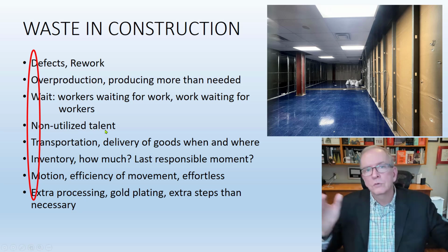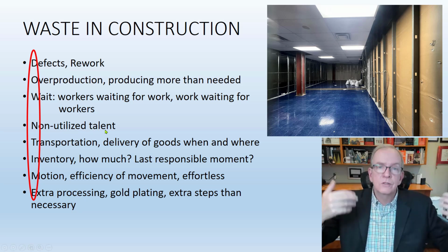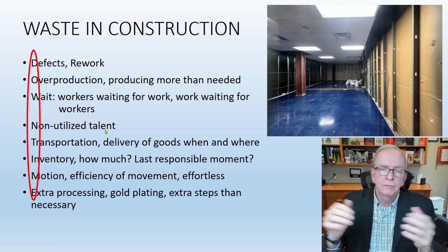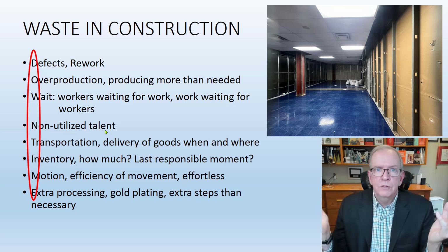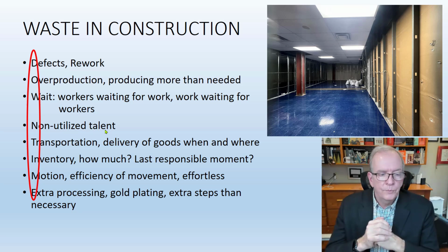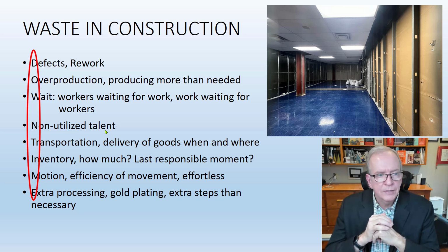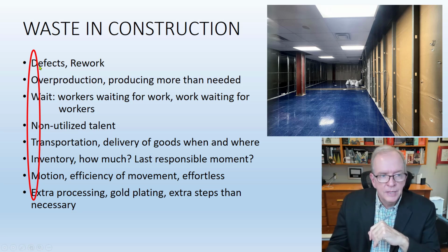Oh, we'll put it in this other room, it's empty. Meanwhile, that's the room the HVAC sub wants to get in 5 weeks, right? And you've got it 52 days early. So big differences, a lot of impacts going across the differing areas. And I'd hazard to say we can definitely get into the defects, maybe not so much this one, the waiting, the transportation, inventory, motion, extra processing, and then I'm even going to bring in the non-utilized talent.